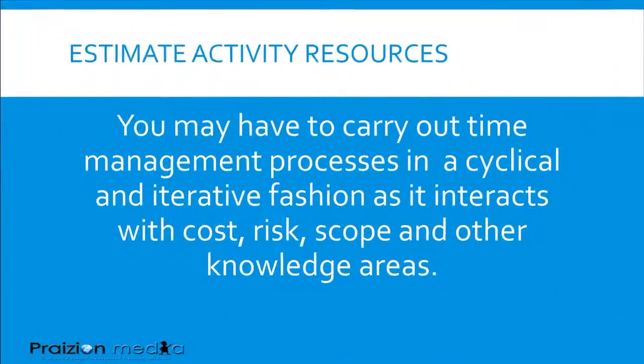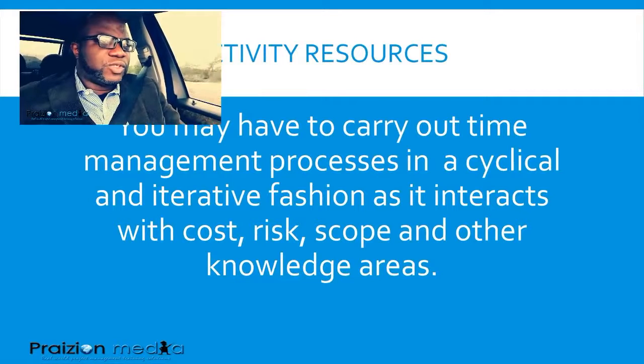Also, pricing could have a big part to play. Think about it. If you have a great resource that can do something in, say, 2 days, and you have another resource who can do it in 4 days, 2 days is attractive in terms of schedule, but in terms of cost, it may not be attractive. So you might want to go with the 4 days because of pricing.